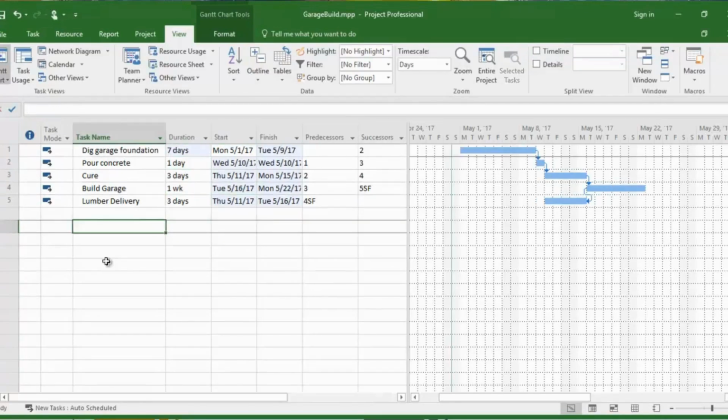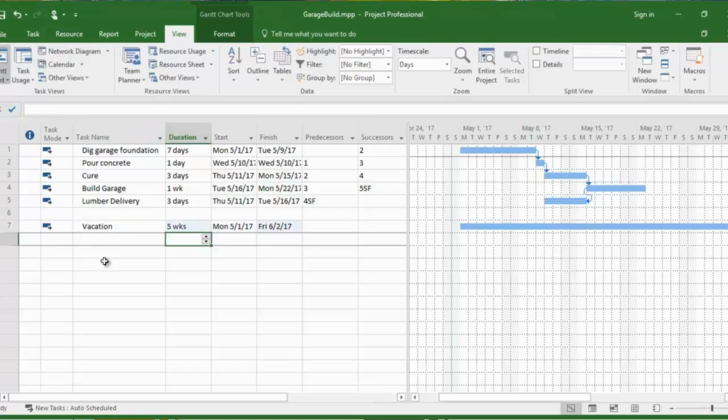And if you're wondering if an unrelated task can impact the schedule of the delivery, you'll see here it has no impact. So the start-to-finish link is a very handy way to create a just-in-time link.